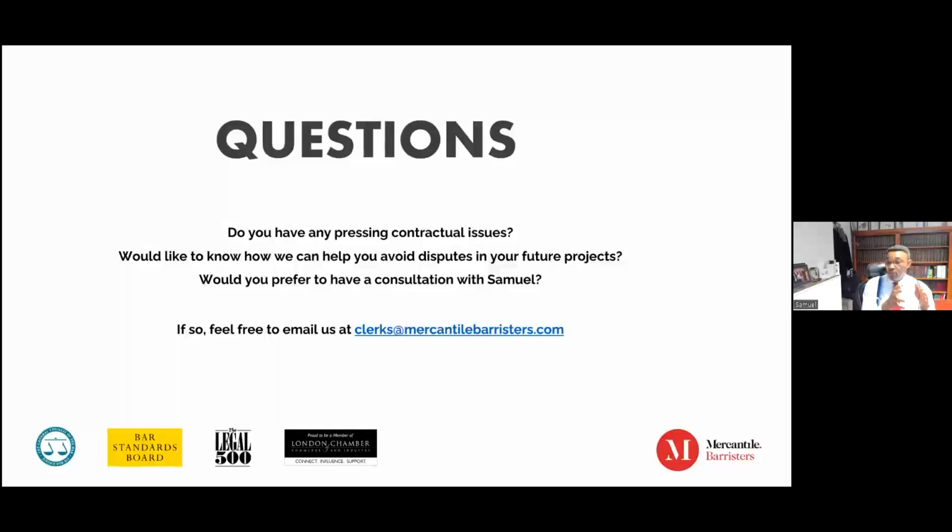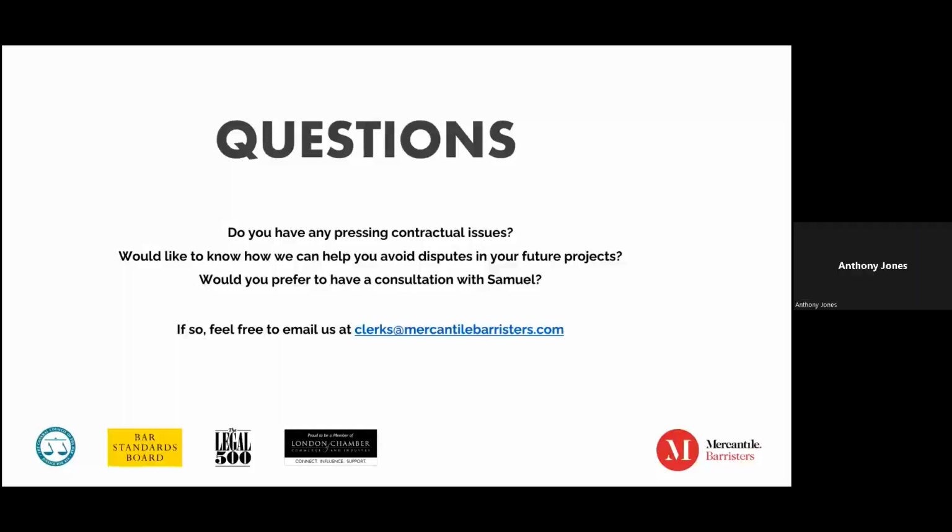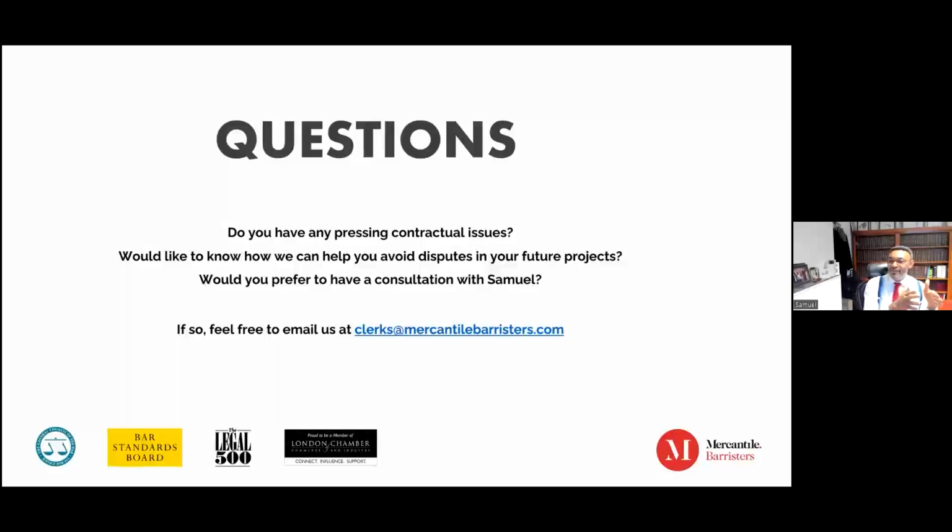And more often than not, you will find that the principal contractor says, look, we hope it will be ready, deliver the components, and then you can fit afterwards. The reasoning for inviting you to deliver those components is that they can be included in the materials on site valuation by the QS when he does his interim valuation.